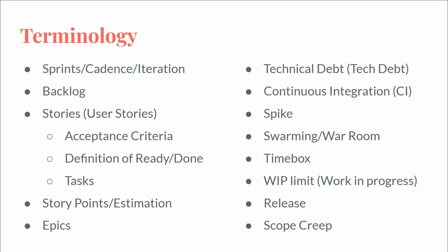I should have broken that work up into 2 or 3 other tickets and done 2 or 3 PRs, because it just ends up being a huge amount of work to review, and that could have been broken up because it could have been scoped out into different chunks. And had it been planned out better, had we actually discussed tasks that need to be done on it, we could have maybe broken that down in smaller chunks.